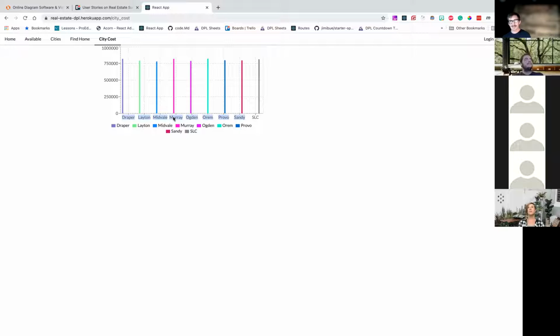Yeah, and it's easier to ask for the time up front, because you might say, oh, I think this is going to take 5 days, and then your project manager might be like, really, 5? Why? And you're just like, I don't know, this just seems hard. That's going to be a lot easier than saying this is going to take 3 days, and then it's day 4, and you're like, I need 2 more days. It really depends a lot on the style of your project manager and the company, how strict they are.